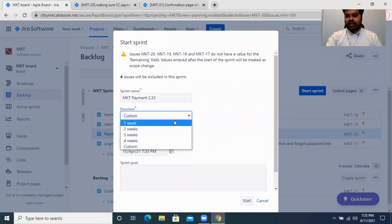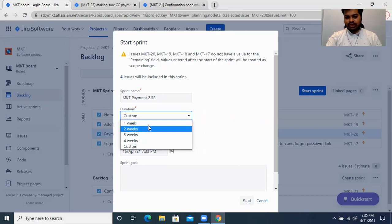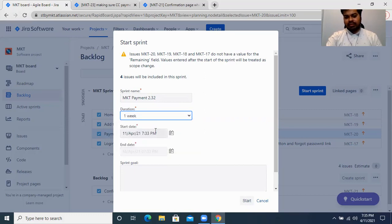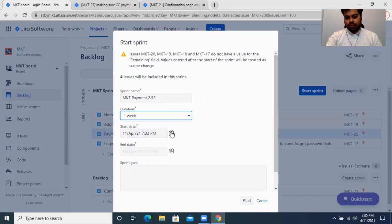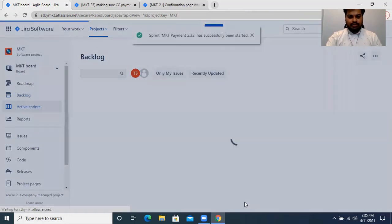Now for duration, they're asking what your sprint duration should be. Generally in most organizations following agile, they follow either one week or two weeks as a sprint duration. Let's say I'm setting my duration to one week, starting from the 12th of April. Since I've given my duration as one week, the end date is calculated automatically. I then click on Start.